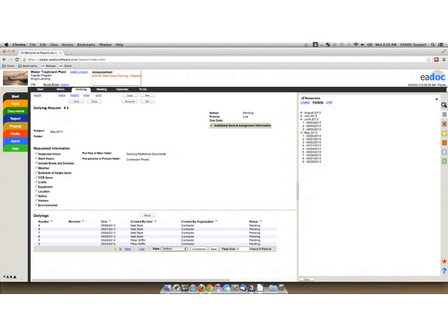So CM team, it may or may not be who's filling it out. There are instances where somebody on the CM team needs to fill out a daily inspection report as well as the contractor. So in that case, you would create two separate requests. The contractor would submit his over on his request, and then your internal member would submit theirs over on their request. Again, as with any document, you can keep them separate in the system. So you would obviously only submit that request internally if you only wanted the staff on your CM team to fill it out and see it. And the contractor wouldn't be able to view it unless you shared it with him manually.